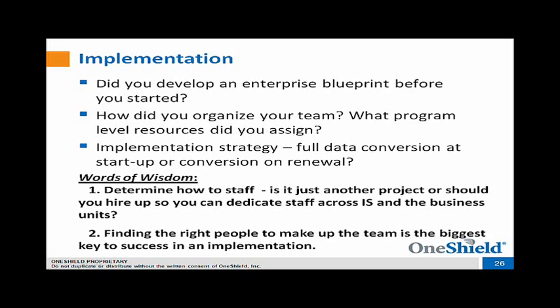has multiple project managers reporting to that person. You may have project managers for release of certain lines of business. You may have a project manager for conversion. You may have a project manager for different threads, but they all typically report into an overall program manager who is the accountable manager for the overall program.